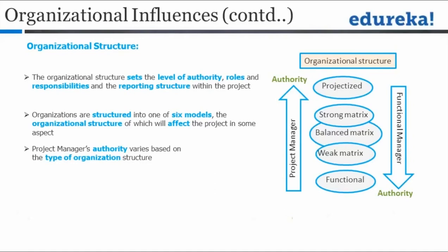On the extreme other side, we have something called projectized organization. Now, in a projectized organization, everything works as a project. So there is a common pool of resources. There is a specific department called project management department, where all the project managers reside. Every work is a project, which is under the authority of a project manager from this project management group, and the various resources come and join and form a project team who will report to the project manager till the time the project is complete. The project team will be released at the end of the project, and they will go back to the pool. Here the appraisal is done by the project manager for their part of the work.